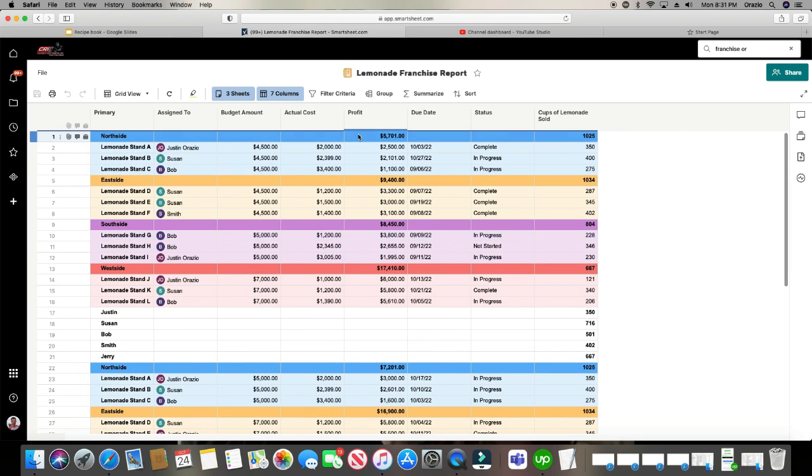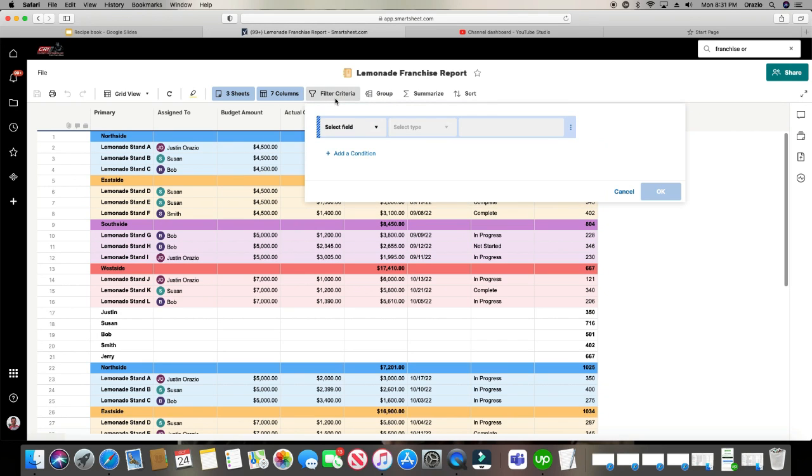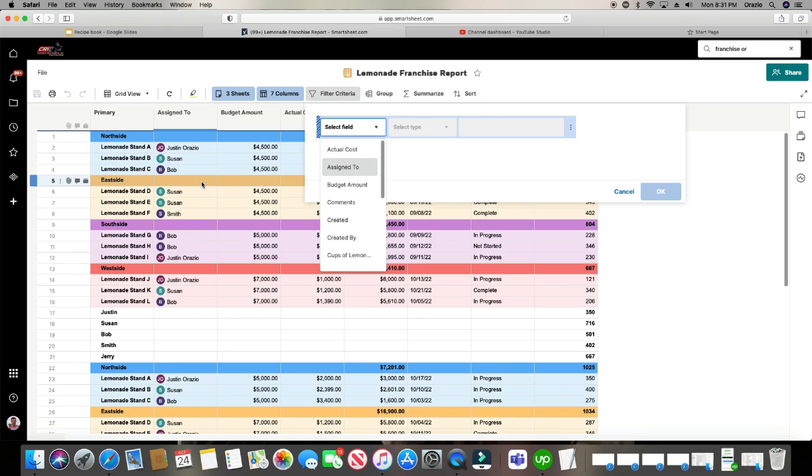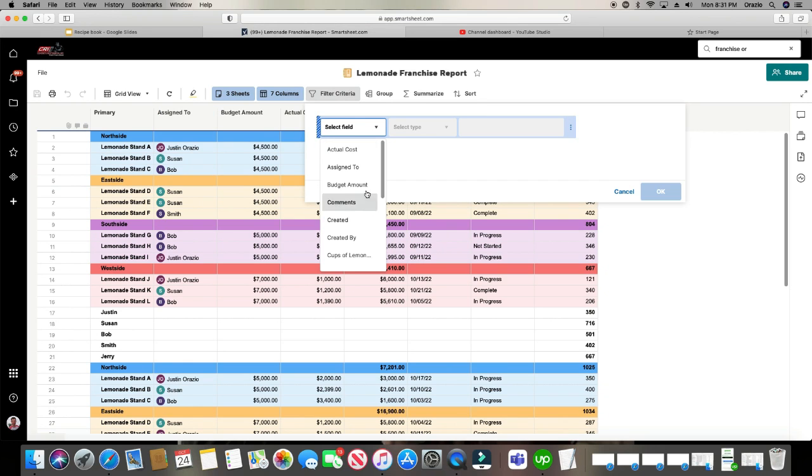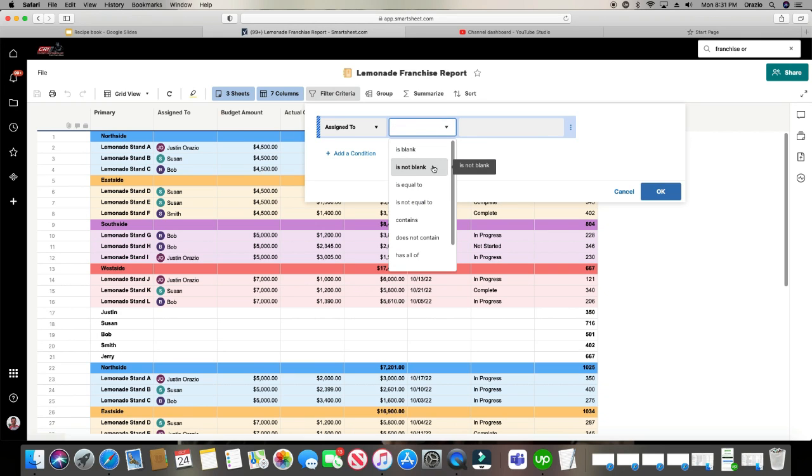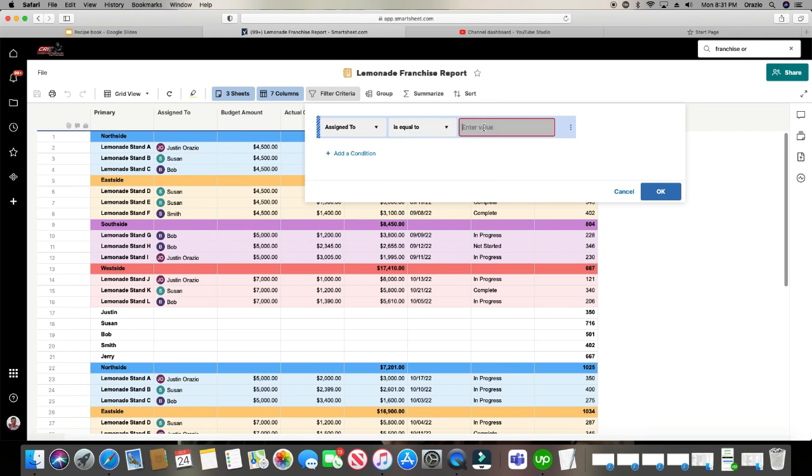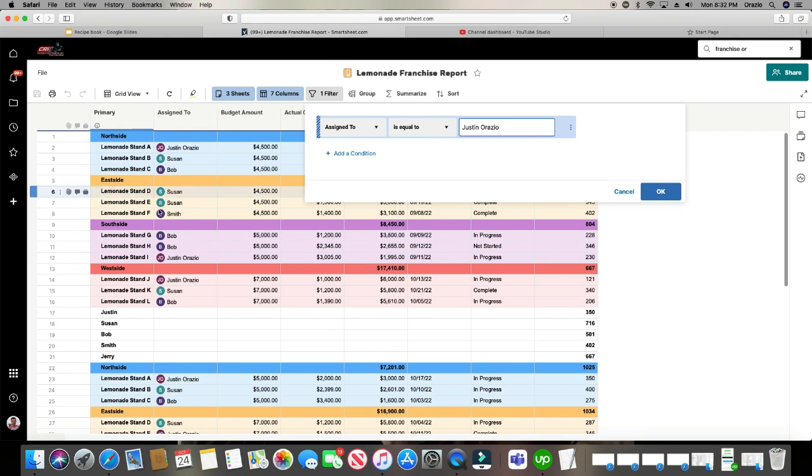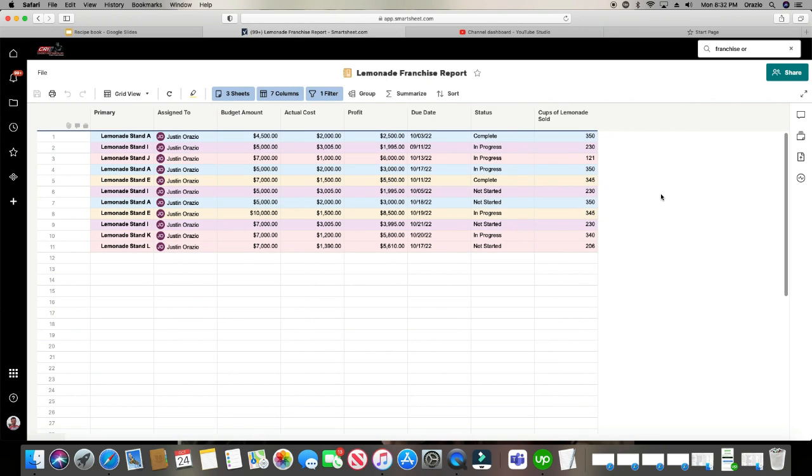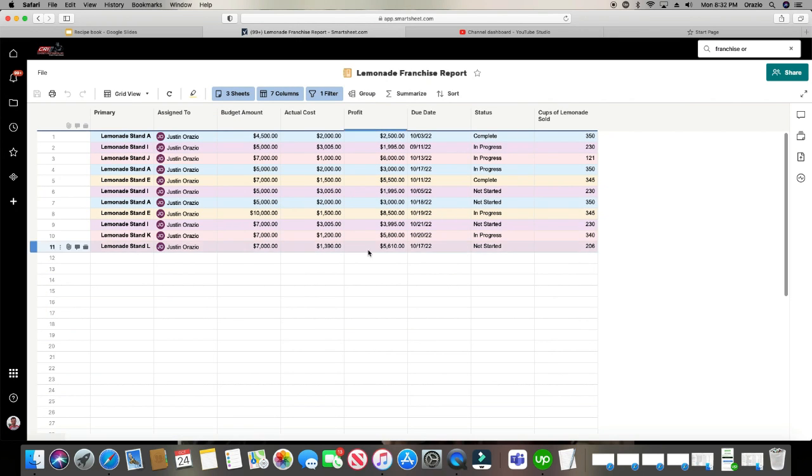And when you want to create a filter, just click on filter criteria. And then you're going to select the field. Let's say I just want to see maybe I just want to see all of them that are for Justin. And Justin is in the column called assign to. So I'm going to go ahead and choose assign to. And I want it to be is equal to Justin Orazio. I'm going to click OK. And as soon as I do, it's automatically going to filter and only show me the rows where Justin is in the assign to column.